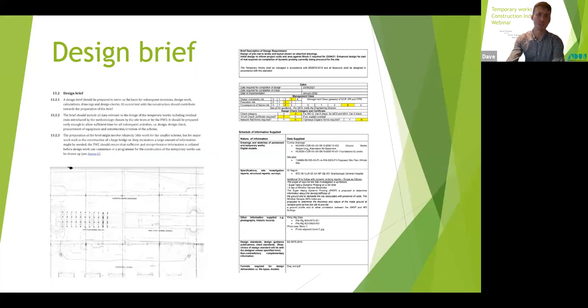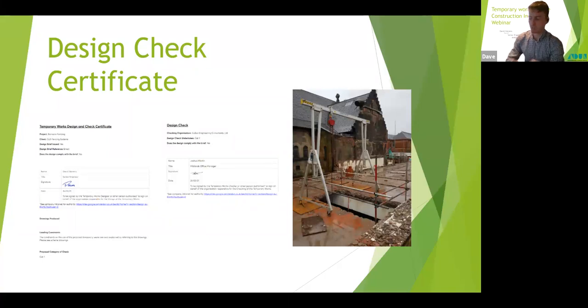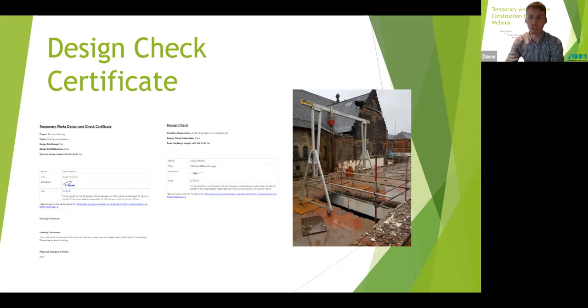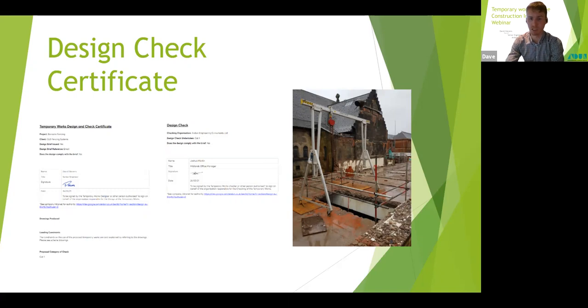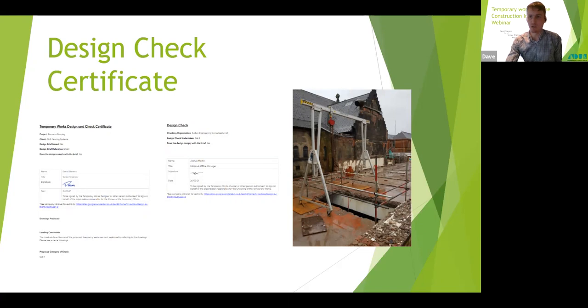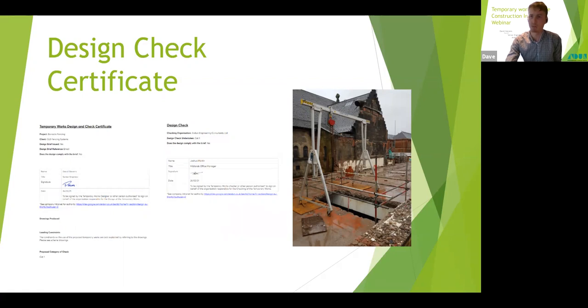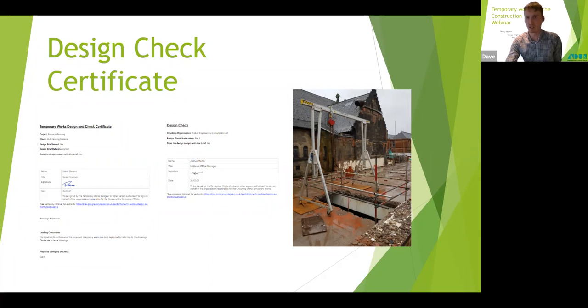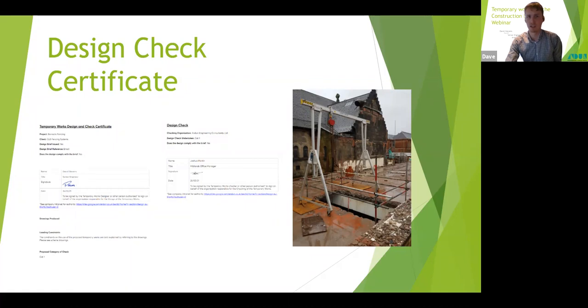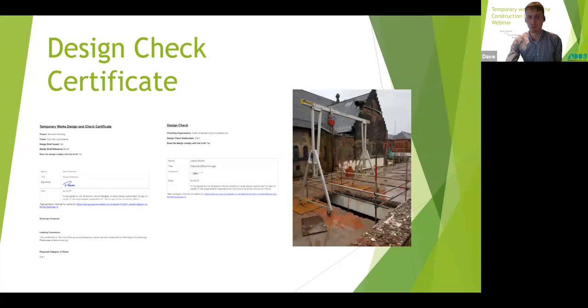So the final thing I was just going to run through is the design check certificate. So this is what's required after a project's been completed and needs to be recorded in the temporary works register, so the TWC has a record that the design has been done. These are carried out by the designers and the appropriate checkers. So, as Josh already outlined, you've got all the categories of check that are required. It's pretty self-explanatory. The designer signs one half, the checker signs the other half. The other things the TWC should be reviewing are like rams and method statements, which are there. And then, as we've mentioned briefly at the end, kind of recording feedback on the project. So as an industry, we're very bad at learning. But if a project's gone well, please feedback the good bits. If projects have gone poorly, then I'm sure you will have fed things back. But let's try and learn and be better at what we do, because it definitely needs to improve.